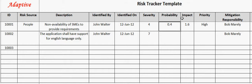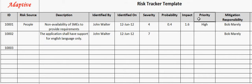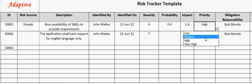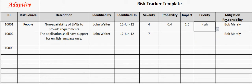Risk impact field captures the multiplication of severity and probability of the risk. For example, here the risk impact is 1.6. Risk priority describes priority to mitigate the risk. It can be low, medium, and high. For example, here the risk priority is high.